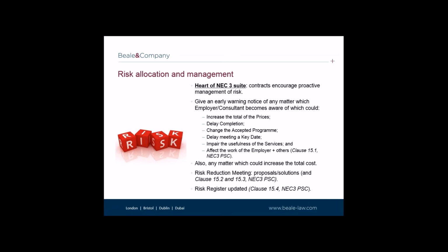Additionally, the consultant is to give an early warning notice to the employer of any matter which could increase its total cost. Following an early warning notice, the intention of clause 15 is for the employer and the consultant to attend a risk reduction meeting if asked by the other, in order to discuss how to mitigate and avoid the risks which have been identified in the early warning notices. Following any such meetings, the employer is to revise the risk register to record what has been agreed by the parties.